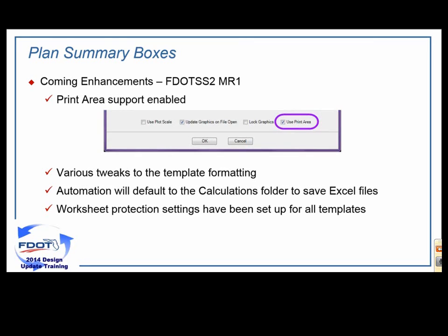I've set them up in all of our templates, and basically we had a meeting with some of the folks in construction, and one of the things that they have requested, more specifically for final estimates, is that when construction gets their files, anything that design has done can be locked, so that when whoever has it in construction starts adding in whatever values they need to, quantities for their final columns within those summary boxes, it is locked so that it can't mistakenly overwrite what